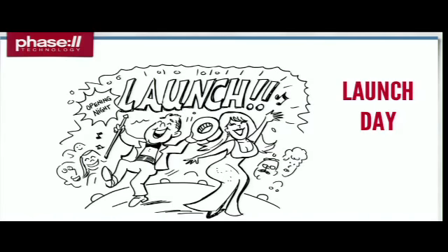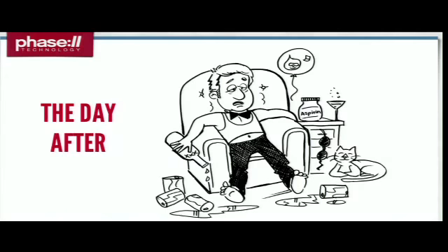You know, a successful launch leads to client satisfaction, referral work, more projects down the line, and success stories that you can tell for your company, and that's what you're trying to build. Never plan a project that ends on launch day. Think about that for a second. Never. It's the absolute worst end to a project plan. Every project plan should end at some point after launch day.